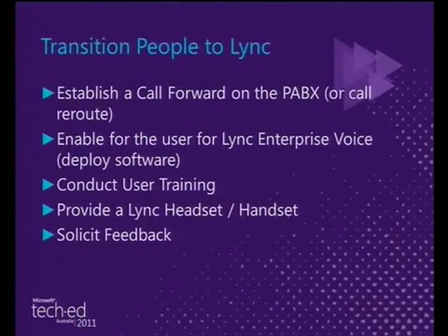But once that connectivity is established, it's then about how do we move people from their old phone to their new phone. And to do that, you'll typically establish some sort of call forward from the current environment to the new, whether that's a handset-based call forward or a PBX redirection. So this is during your migration phase, right? You still have got your old PABX. You're either piloting Lync and you want to just transfer your calls away from your existing PABX into Lync. So that's one of the options.